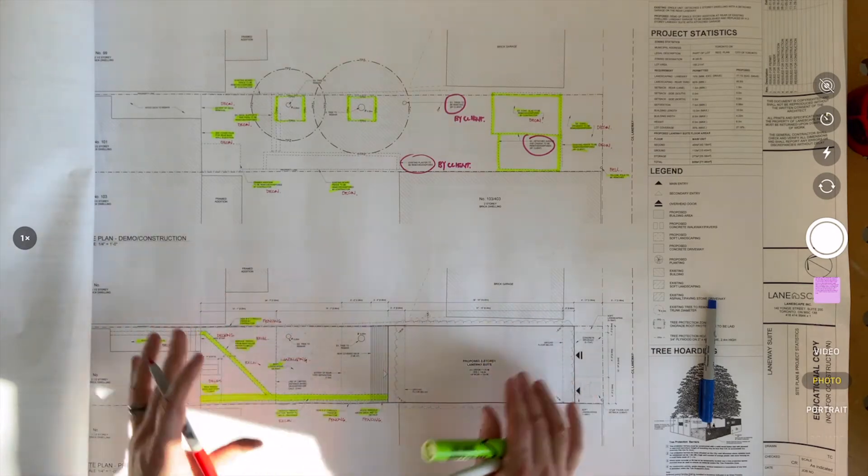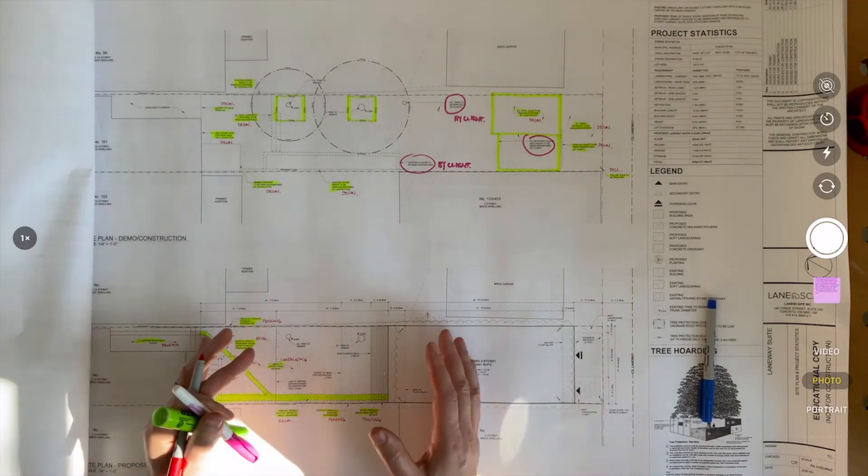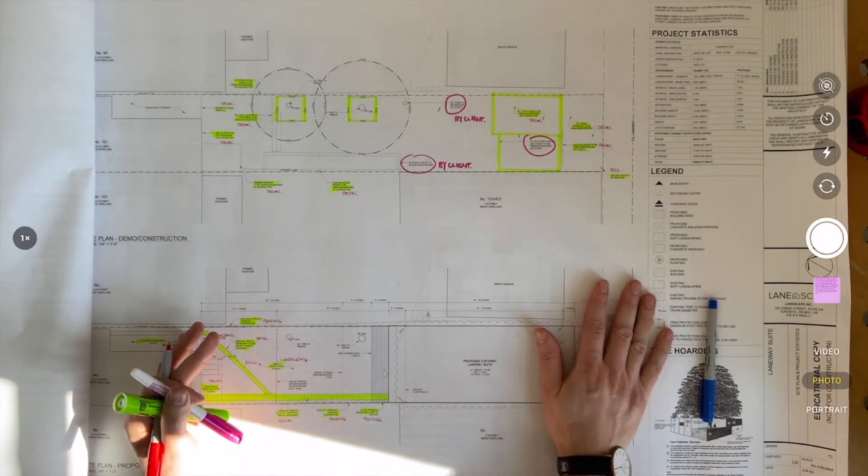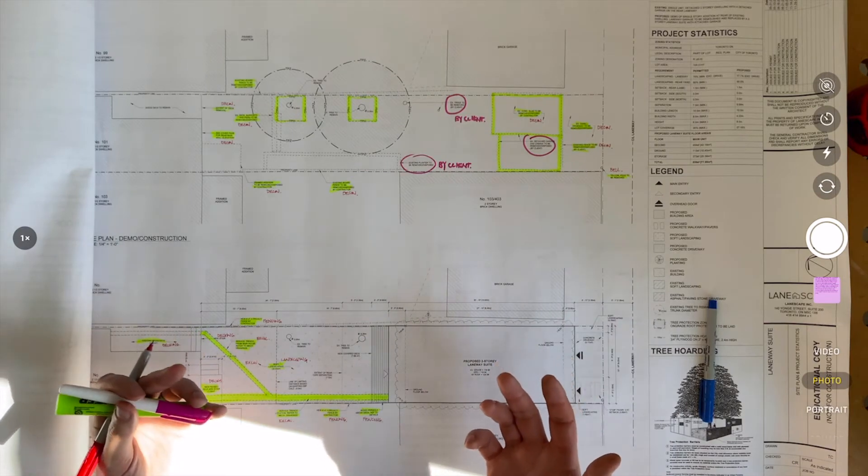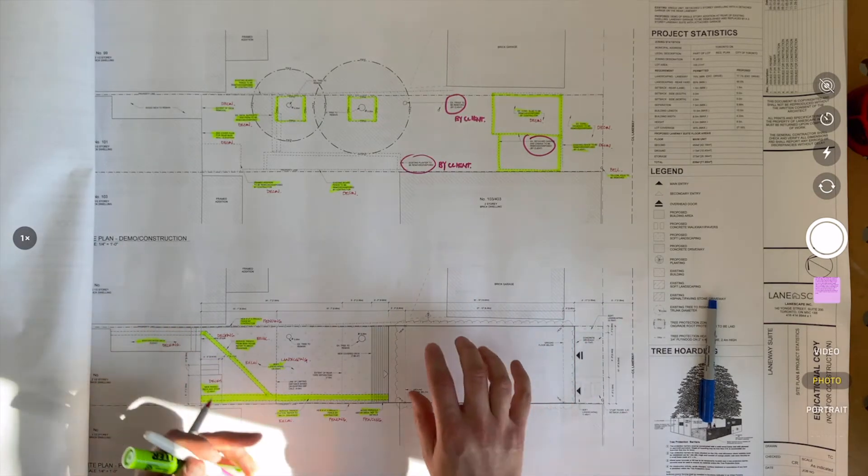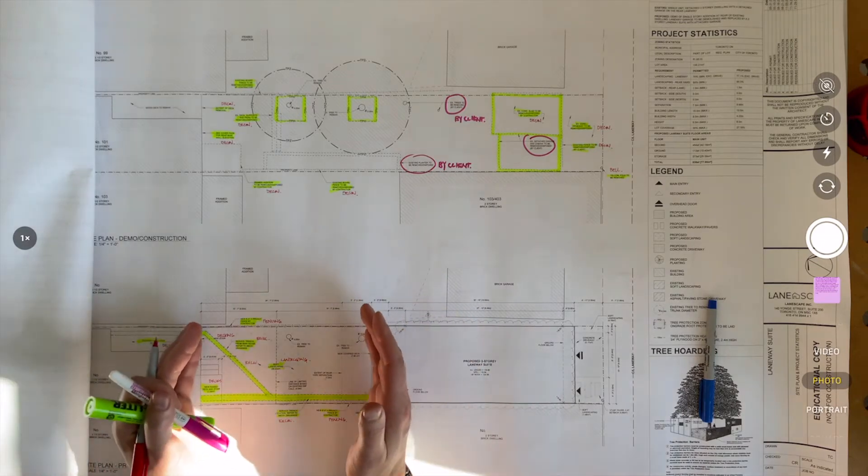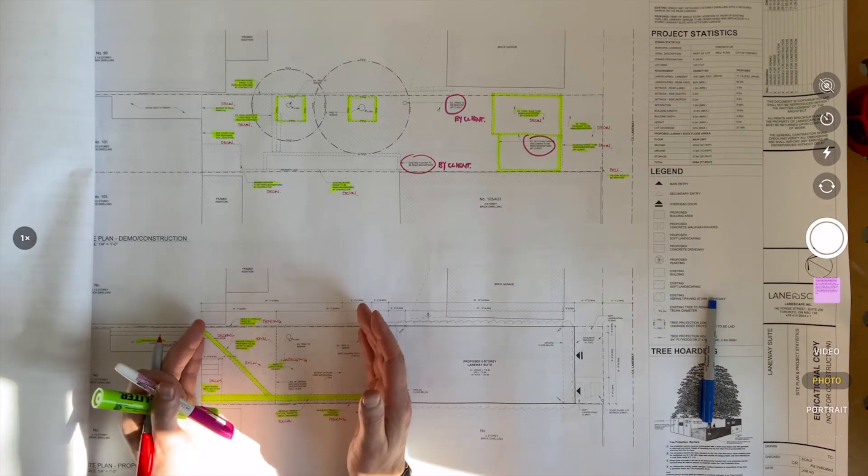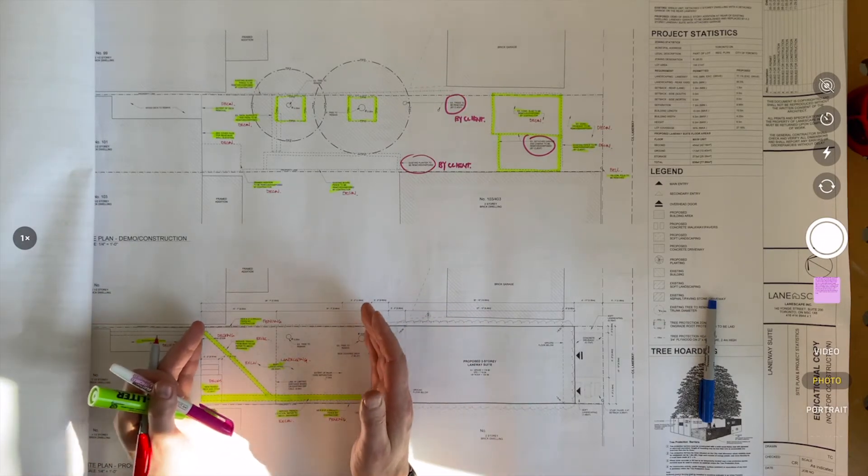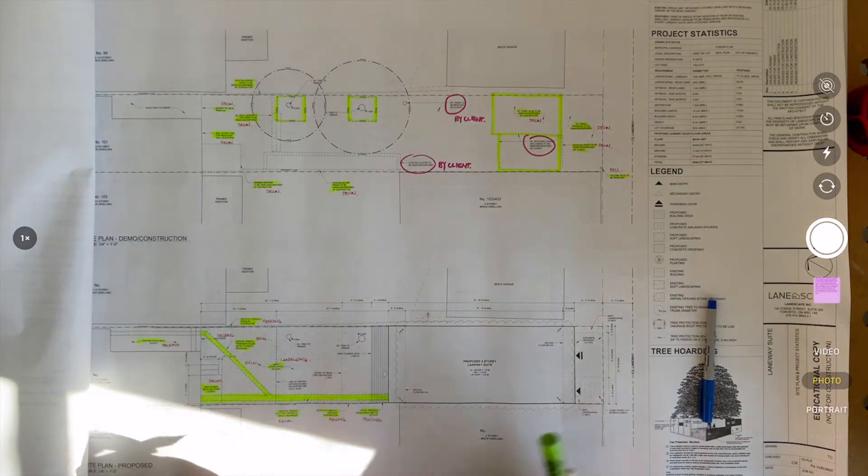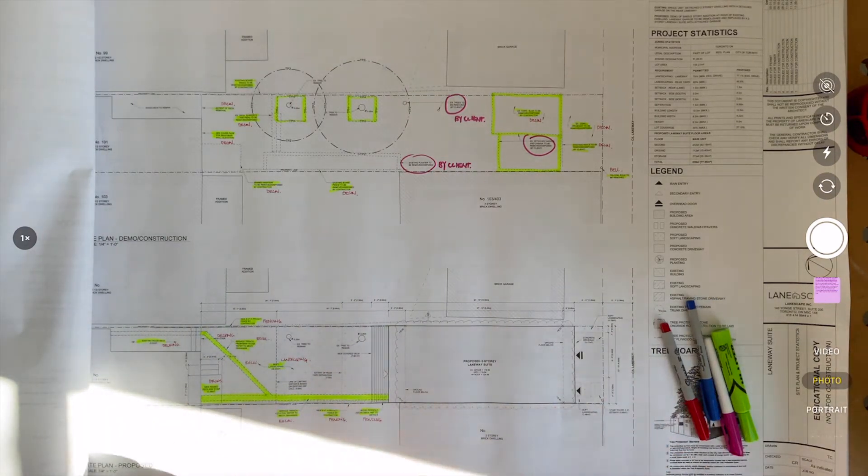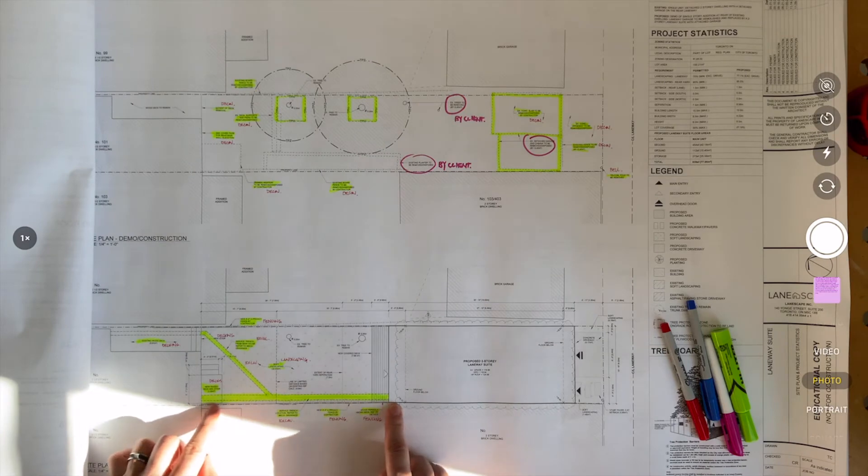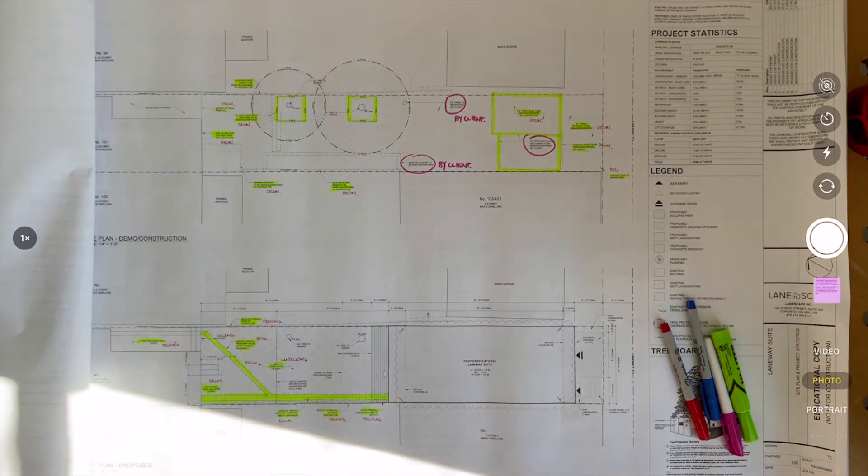So that's the beginning of how we start to use highlighters and really how we track what we call unlisted activities, because they're not related to the building of the main structure, but we have to do them. So we have to include cost and time to break those down. So if I want to continue that and figure out how much new fencing do I need, we start getting into doing takeoffs.